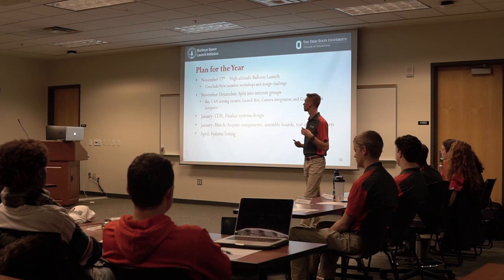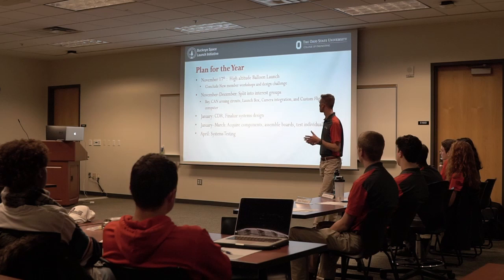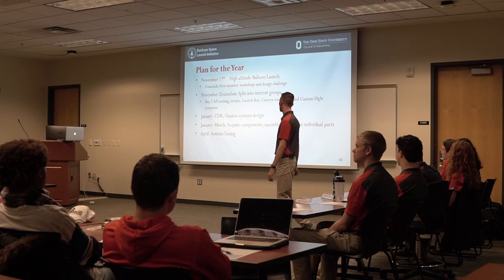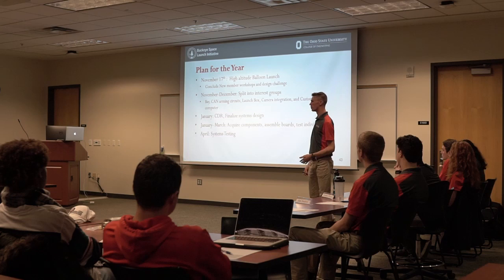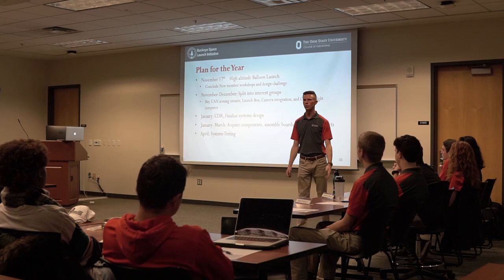And then in November, December, we'll be splitting into interest groups. I have several listed out there, just different things that people will be working on as they go along. In January, I have a CDR right at the beginning, so we'll finalize our systems design and figure out how all the parts are going to fit together. Then January through March, we'll be acquiring the components, assembling the boards, and testing the individual boards as we go along. And then April, we'll be in systems testing and preparation for our test flight. So that's all I have.